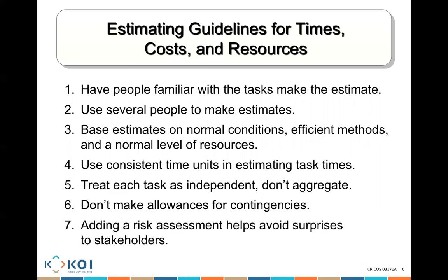Use consistent time units in estimating tasks. If you use hours, if you use days, whatever you use, just make the estimation consistent. If you have more than one task and task B needs to be completed after you finish task A, don't treat those tasks as related. Treat each task by itself. How long do you need for task 1? How long do you need for task 2?